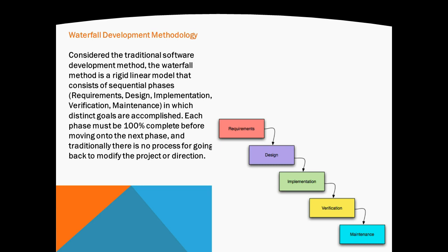The linear nature of this method makes it easy to understand and manage. Projects with clear objectives and stable requirements can use the waterfall method. Less experienced project managers, project teams, and teams whose composition changes frequently may benefit the most from using the waterfall development methodology. However, it is often slow and costly due to the rigid structure and tight controls. The drawbacks lead us to explore other development methodologies.